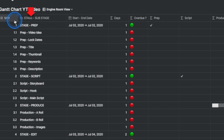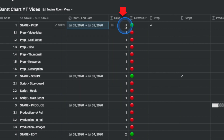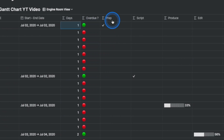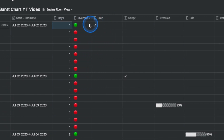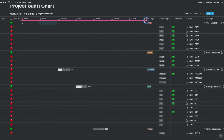I started adding the columns relevant to the Gantt. After the mandatory column that captures the tasks and activities, I added the start and end date, a days formula column, an overdue formula column indicating whether the task was overdue or not, and a progress bar column for each of the tasks — seven in total.